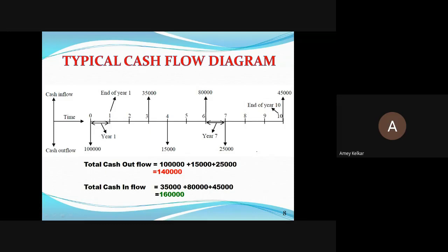Then once the brickwork starts and you start making the payment, you can balance the outflow. Otherwise, your cash outflow at a certain period increases. So as a project manager, what you have to see is that those activities which will have a heavy cash flow do not occur simultaneously. If they occur simultaneously, your financial needs in that particular period will increase.